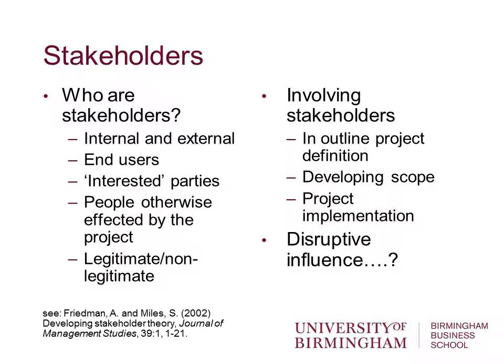Finally, a point which I will pick up later on in the module is about the disruptive influence. Stakeholders tend to try, if they're involved in the project in some way, in the definition, in the scope development, in project implementation, to grab or pull value to them. This may well be at the expense of others and may involve slowing down the project or adding additional cost to the project as they try to get more value in terms of more scope and more outcomes for them.